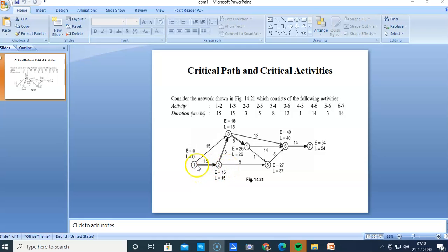Okay, and the activities or nodes for which the earliest start time and latest finish time are the same are known as critical activities. So we get this path, and now I am putting double arrows to signify that this is the critical path. Along this, there are critical activities. Critical activities are those activities which, if we delay them, the total project duration will be delayed.